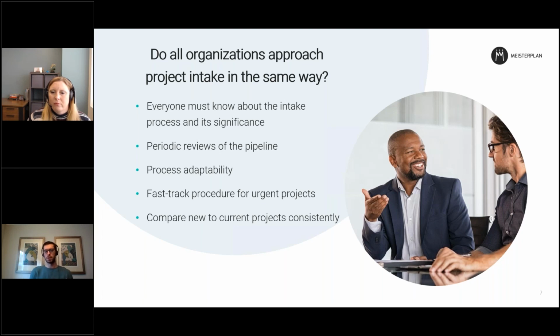We saw organizations accelerating the periodic intake activities from a quarterly to a monthly cadence and adjusting their evaluation criteria based on the strategic shifts necessary due to COVID. This required some work and reprioritization of the portfolio, but once this was done, the intake process was still familiar and these organizations were able to respond to the changing environment a lot faster than others.